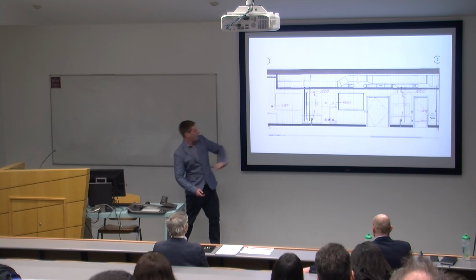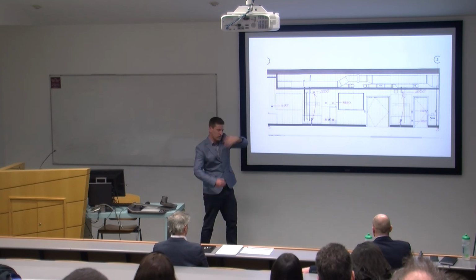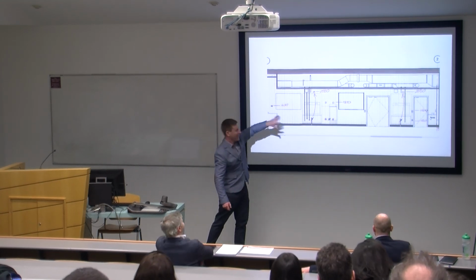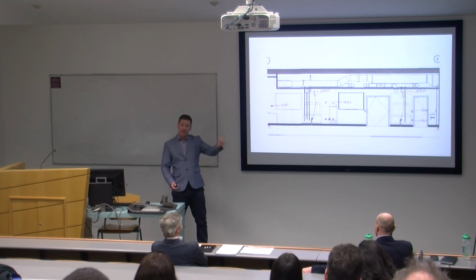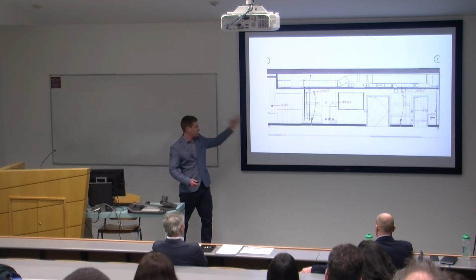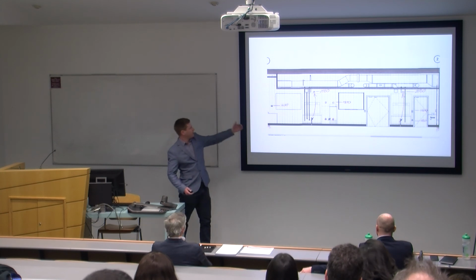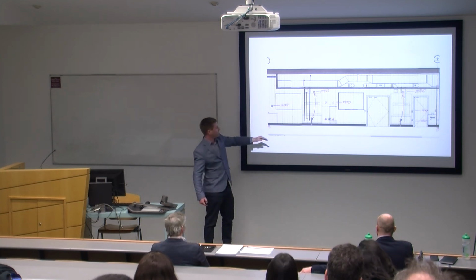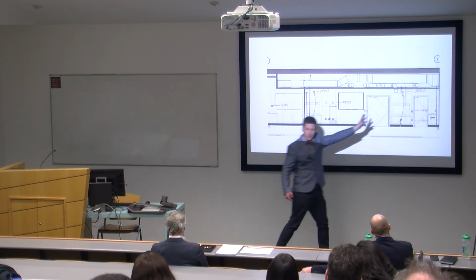So we said, right, we just redline it. Which redline is you actually print it off and you put in your dimensions and say exactly where everything's going so that you can keep the job moving. And I know you're taking a step back, and you're going to a paper environment, because this is done with a red pen and paper. But it's the fastest way of doing it. And you're still keeping all the standards, you're still keeping the heights right, you're still keeping everything in the right place. A lot of stuff there had to be moved around the doors and stuff so that it's at the right level.